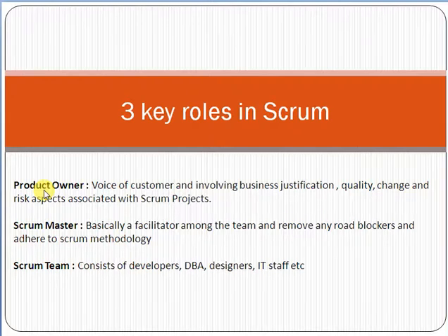Like for example, if the team has to deliver an e-commerce website, the product owner drives the project. He defines the stories and requirements of the customer, and also sets the priority and the acceptance criteria. Overall he owns the project, and he drives the overall product.